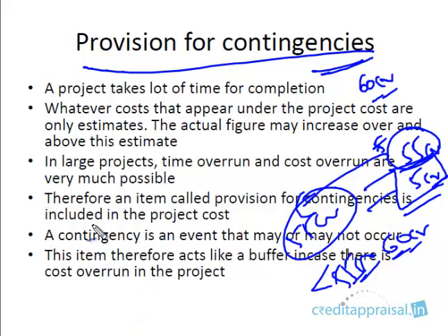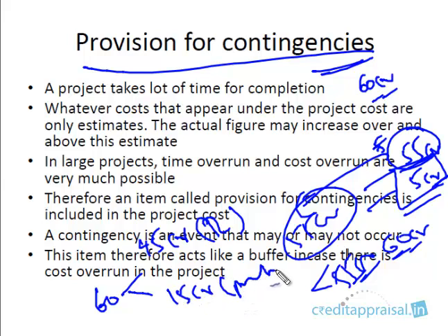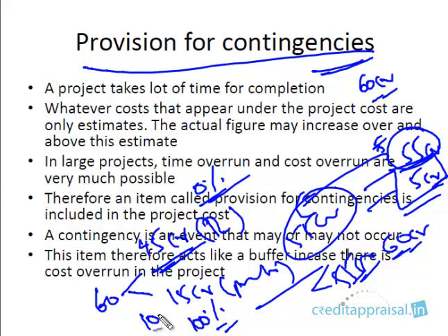If this is financed, say for example, of this 60 crores you have 45 crores by the bank loan, term loan, and 15 crores by the promoters. And while arriving at this term loan eligibility of 45 crores, you have not taken the provision for contingencies. So bank has not financed this contingency. 100% was met by promoters. In such a case, should the situation arise where this 5 crores was not spent, obviously the promoters then need to bring in only 10 crores, because that did not arise.